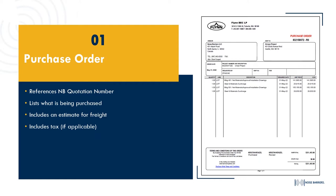The cleaner the PO, the cleaner we can bill and keep things organized on our side. If your salesman provides a freight quote, it's great to put that estimated range on the PO — it keeps us in line and serves as a good placeholder so there's no confusion regarding who's covering the freight and how it's billed. We're also really pushing to have the ship-to address provided at time of purchase order. If you have it and can provide it, it helps us down the road so we don't have to follow up asking for the ship-to location. The more information up front, the better.